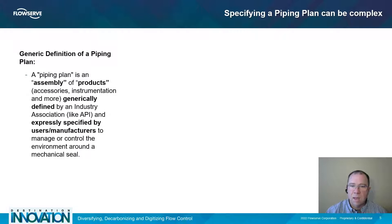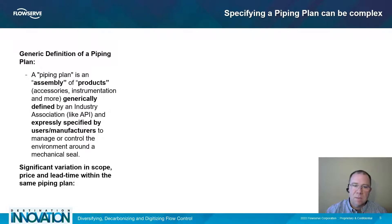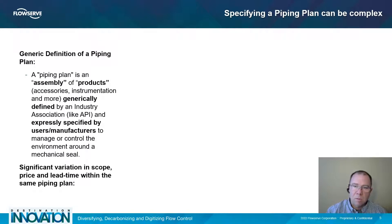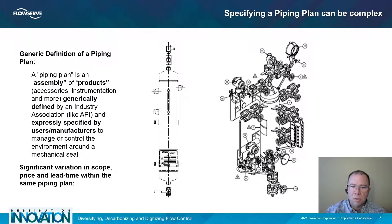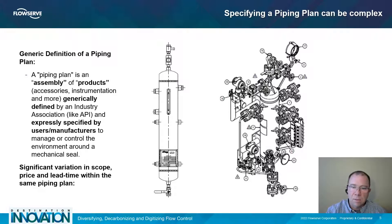It's up to the end user or the manufacturer of the piping plan to expressly specify all the details, components, and construction of that piping plan. This means you can have wide variation in scope, price, and lead time all within the same piping plan. For example, for a Plan 53A, the left example is a common general industry piping plan that can typically cost around two to three thousand dollars with a lead time of less than one week. On the right, you can see a Plan 53A commonly used in the oil and gas industry on large projects.